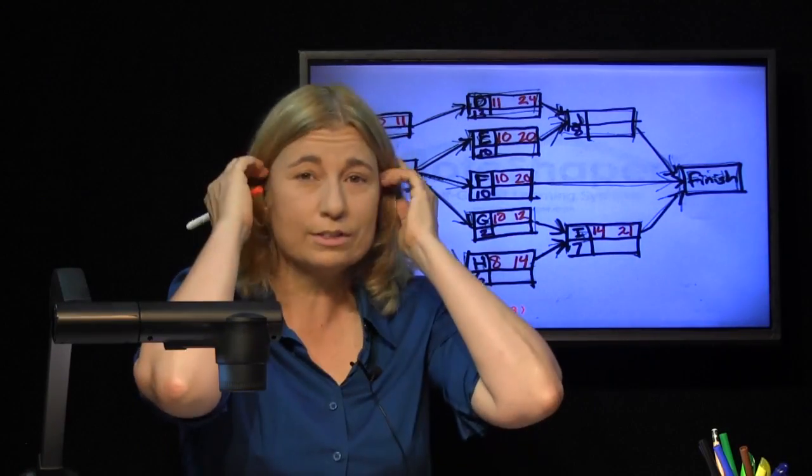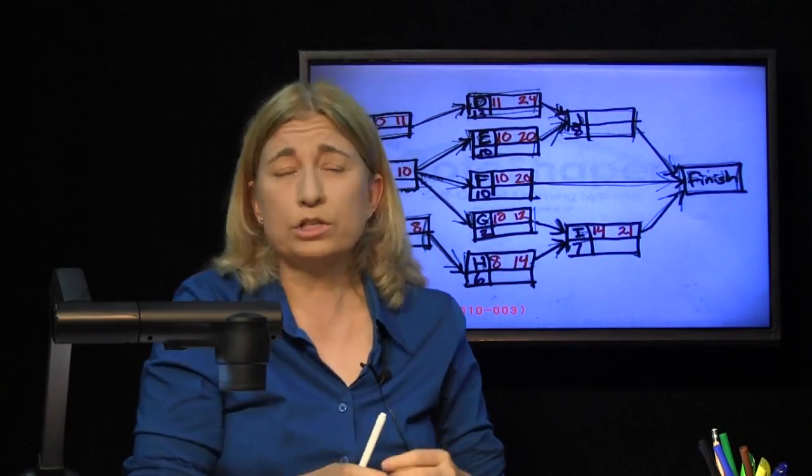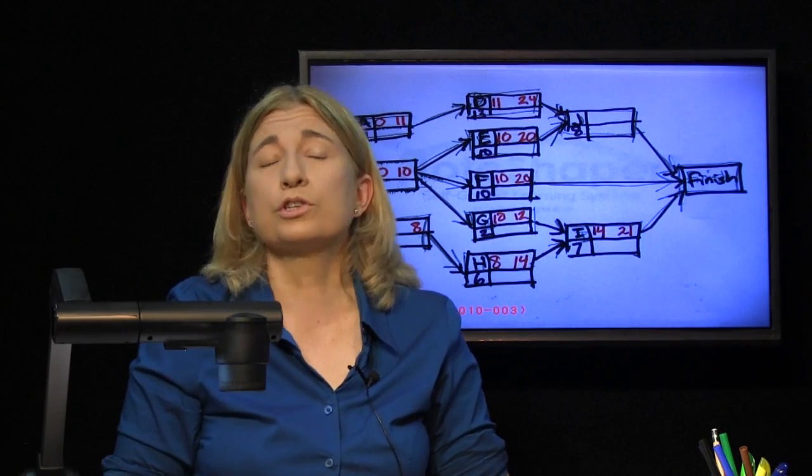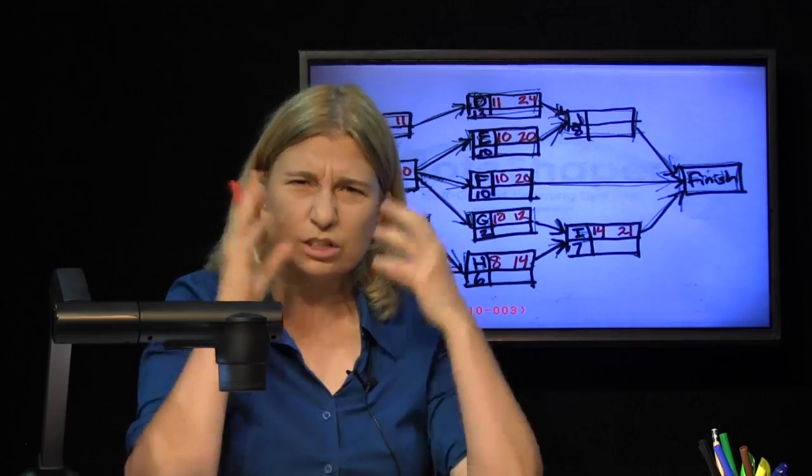And that logic that we just did there, we remember, that is called the early start time rule. The early start time of an activity is equal to the largest of the early finish times of those activities that immediately precede it. I think it's easier to just picture what we're doing, but you could memorize the rule.